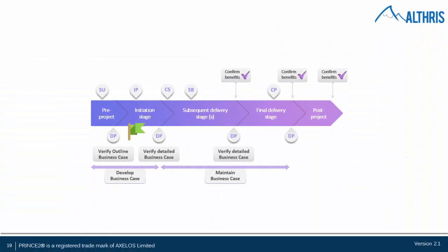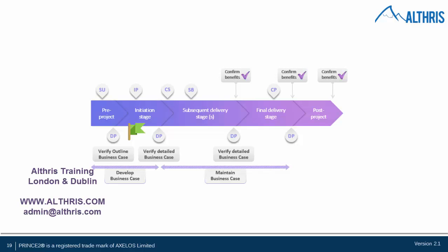So that's it. The business case has a journey from starting up, where we create an outline business case, all the way through to verifying it at the initiation stage, maintaining it as we go along, and verifying and confirming the benefits as we run through our project.